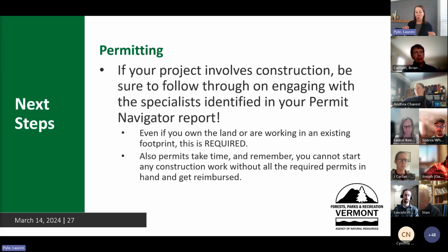But know that no matter what, if you do need some kind of permit, and just because you own the land doesn't necessarily mean that you don't need a permit, or just because it's zoned in a certain location. These are the state level permits generally that we're looking at, things like wetlands and stormwater and those sorts of things. Just know that the permitting process, if you do need a permit, generally takes time. And per compliance requirements, you are not allowed to start any construction until you have the permit. So just think about that now in terms of your timeline. So you're not allowed to start construction.